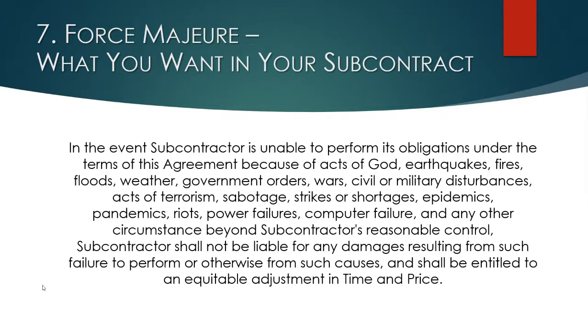That means they're not going to read a lot into it. They're not going to try to imply types of events that aren't spelled out in the provision. So, what does that mean to you? You do want to list out as many specific events as you can.